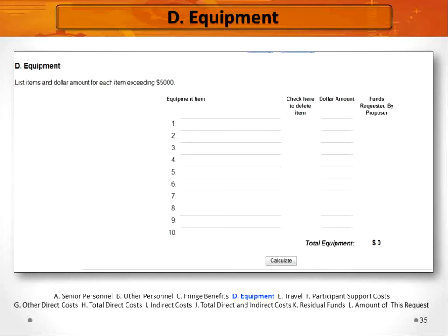And all equipment and instrumentation purchases must be necessary to support your grant activities, not something that's otherwise available and accessible, and acquired in accordance with your college's organizational practice. Any equipment purchased with grant funds must also have a service life of over 1 year.